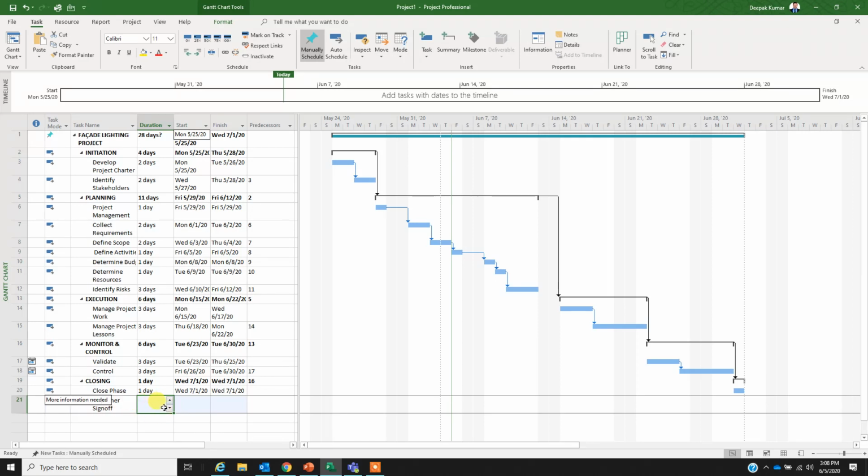I know this is going to be a task and I have, let's say, 4 days to complete this task. The system will reflect this information this way because there are no definite start and end dates. So the ends of this bar are hazy, right? It's not clear. So that's how the system is going to reflect a manual task in the Gantt chart as well. Let me just give you one more example.